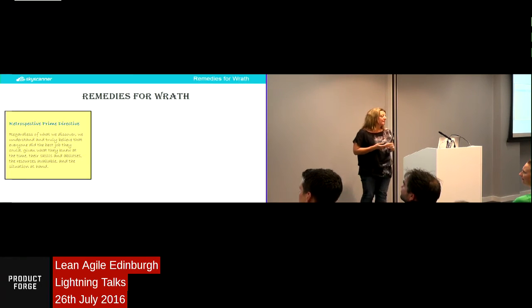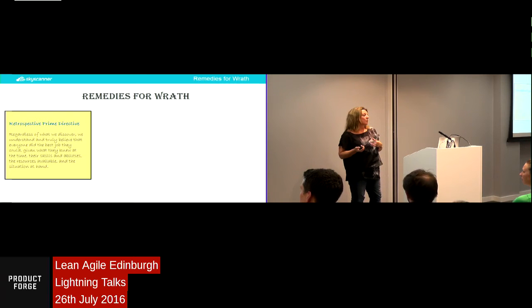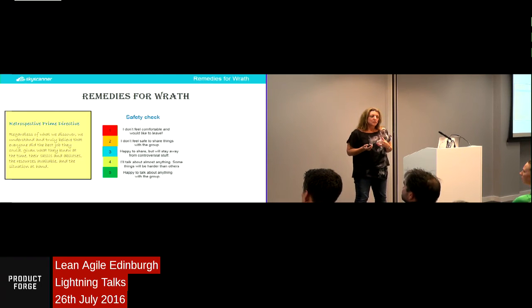So what you do is you ask people to rate from 1 to 5 how safe they feel to share things with others in the retrospective. So 1 would be, I really don't feel comfortable and I want to get out of this room as soon as possible. And 5 would be, I'm really happy to share anything or talk about anything. And you might find if a lot of people on the team are rating a 1 or a 2, you might not even want to go ahead with the retro.